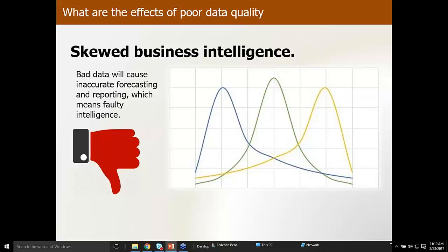The number one problem caused by low quality data is the risk you take when using that data to make important business decisions. If your data is full of errors, any data analysis that you run could be completely and utterly wrong. For example, if you don't update your cost plans regularly because it's too time consuming, then the probability is that the data is outdated and flawed due to changes in scope across your projects.